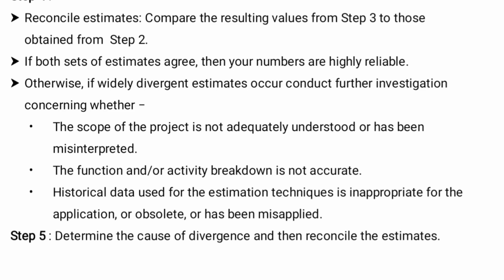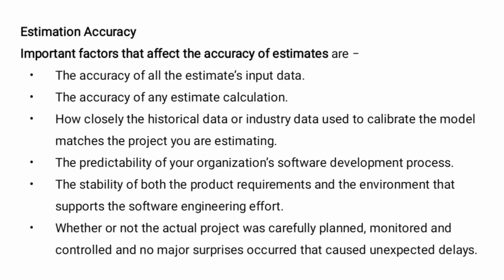Otherwise, if widely divergent estimates occur, conduct further investigation concerning whether the scope of the project is not adequately understood or has been misinterpreted, the function and the activity breakdown is not accurate, or historical data used for the estimation technique is inappropriate for the application. Then the next step 5 is to determine the cause of divergence and then reconcile the estimate.